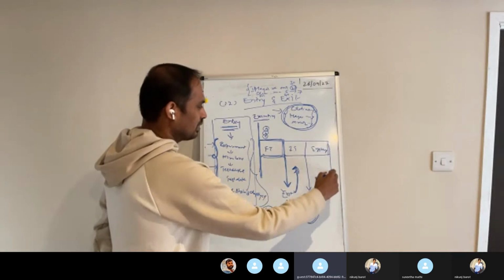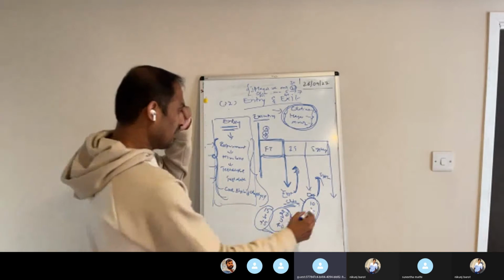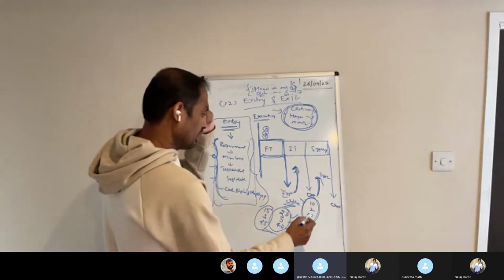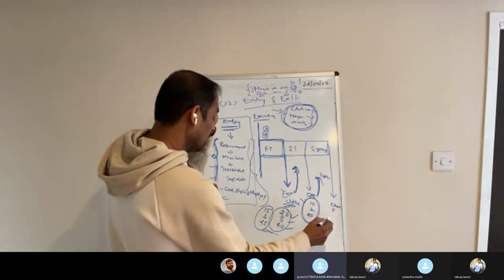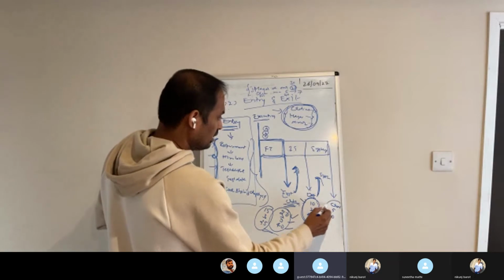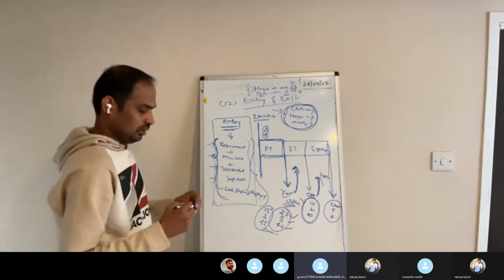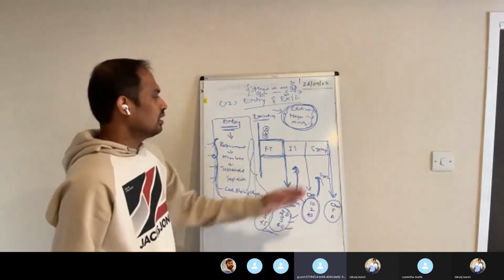So what is the exit criteria for system testing? We should not have any critical defects. We should not have more than 5 major defects. We should not have more than 10 minor defects. Then only this project can be delivered to the customer. That is the exit criteria for testing.